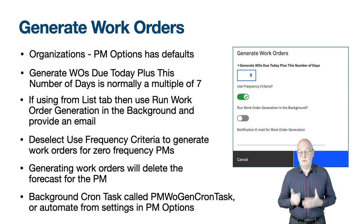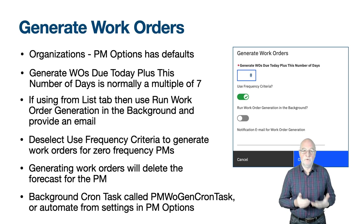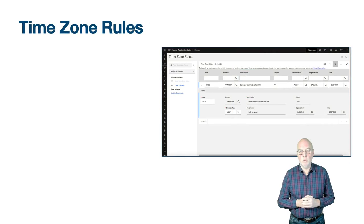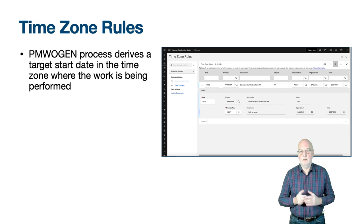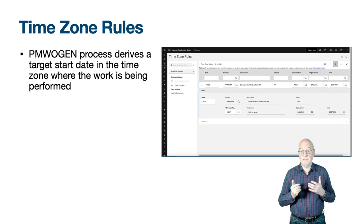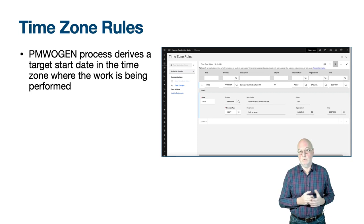You can have multiple instances of the cron task for greater flexibility. For example, a utility company with one site and many regions can spread the load, with each area having work orders generated at a different time of night. Each cron task instance takes three parameters: a site ID or comma-separated list of site IDs, a SQL where clause to filter PMs, and a log file directory and file name.